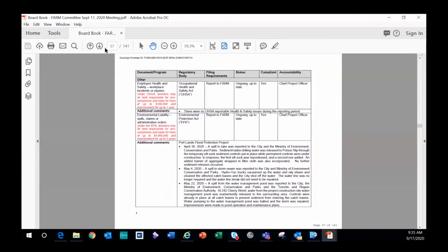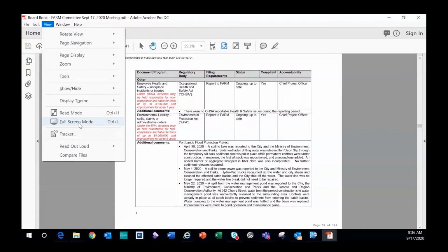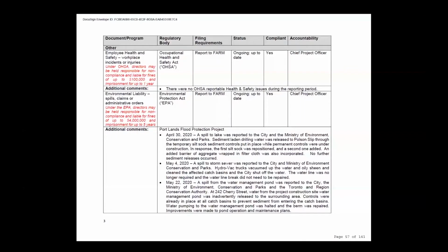Absolutely, when the spill is a reportable spill. When it's not a reportable spill, there is still follow-up and sign-off by our environmental team. So while some of the spills may be such that they need to be reported to the city and province, and those are spills that potentially enter into the Lake Ontario retaining channel, we've had some of those, and they've been water spills, by the way, as opposed to anything else. But yeah, they are absolutely done. Reports are done. The ministry will follow up, come back to the site, and sign off that any mitigation and additional work has been undertaken. And then they're closed out in that way. Okay, great. Thank you.